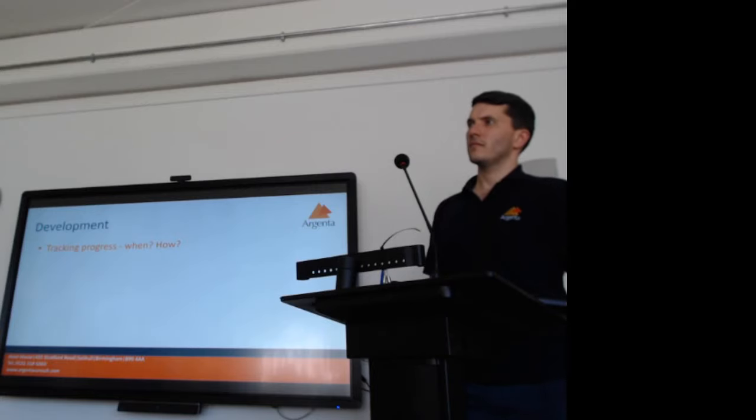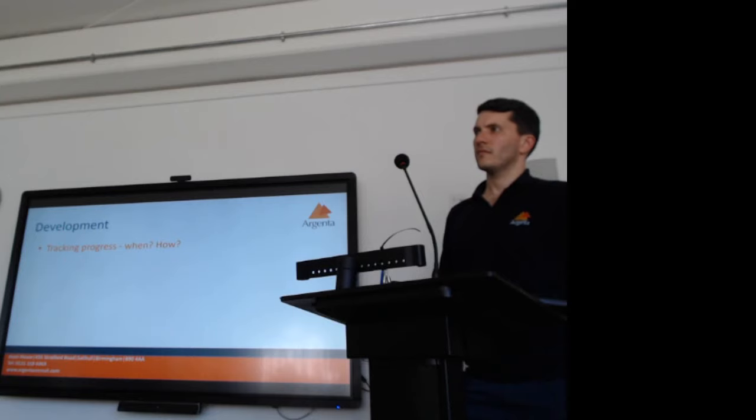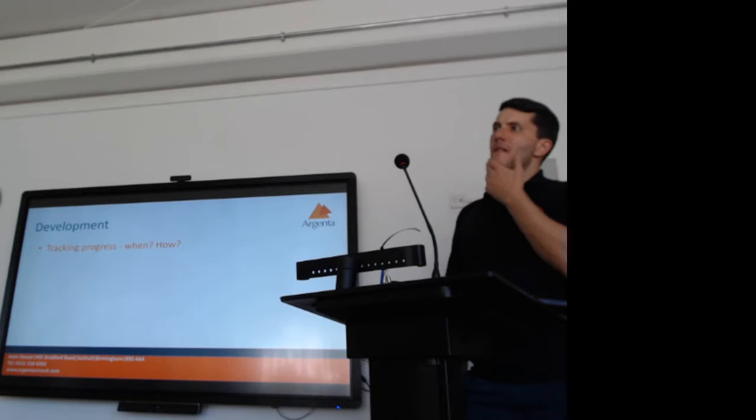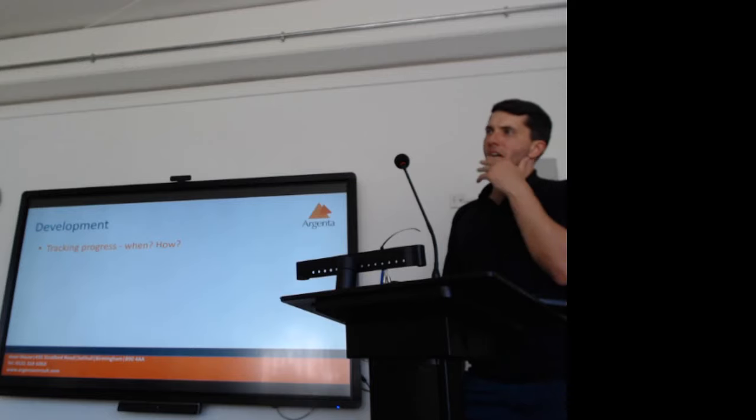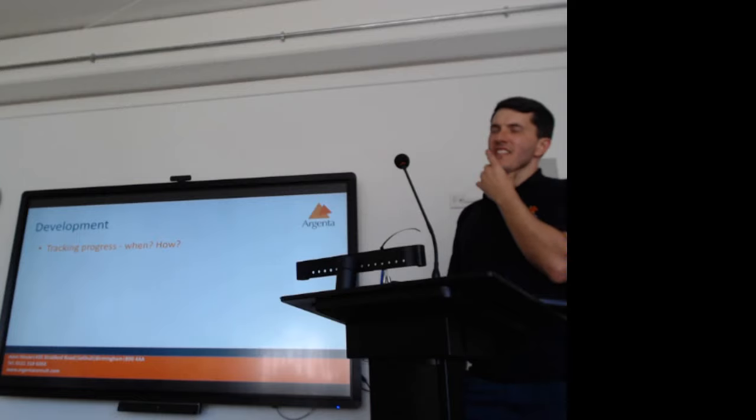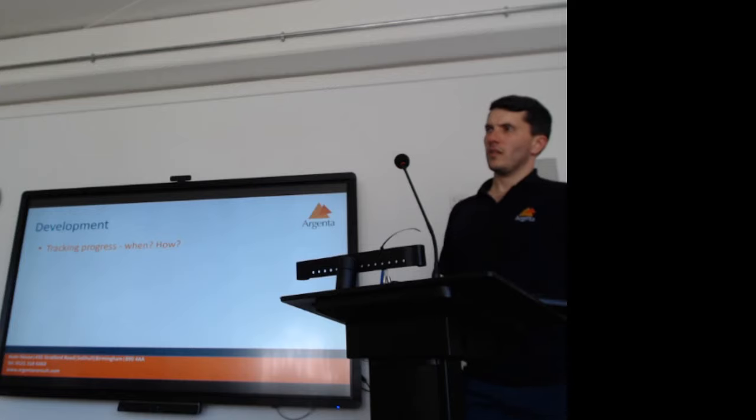I think it helps, and I've never quite decided whether I'm doing it right or not. The tasks I put in JIRA are pretty fine-grained. So everything is less than a day, and mostly it's a couple of hours per task. So that keeps that very close feedback with it and keeps me engaged with it. If I put stuff in that was like 3 days, I could see it would be easy to forget to open it or put stuff in. Or you lose track more easily then, don't you? Yeah. But it means I'm doing more work up front. But that's always worked really well for me. Yeah, it's quite an easy sort of status, I guess.